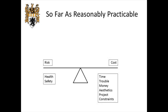If you know nothing else about health and safety, know this: the vast majority of health and safety legislation comes with the phrase 'so far as reasonably practicable' attached to it. Experts spend months talking about this. According to the definition laid down in the Edwards v National Coal Board case, it's essentially a balance — a seesaw. We put the risk of injury or risk to health on one side, and on the other side we put the cost of doing something about it. So if there's a risk of death, we've got to spend a lot of cost to get rid of the risk; if the risk is a slight bruising on the finger, the cost relates to that as well. Always in balance.